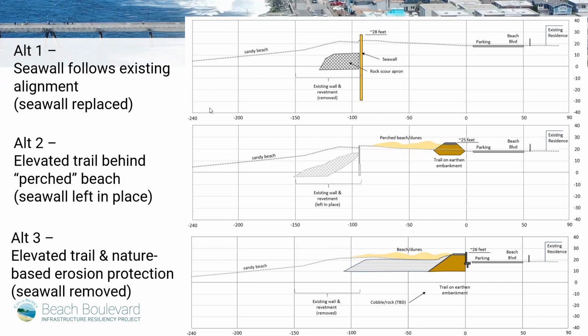In terms of what the Coastal Commission will or will not allow, we've had several meetings with coastal staff, and we're still working through the concerns, but they have not said outright that they would never approve a seawall. We're working at the staff level, and the staff is looking at the Coastal Act and whether your project aligns with the policies of the Coastal Act. That's the lens we're looking through.